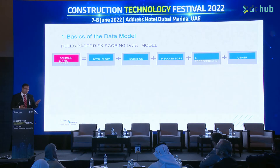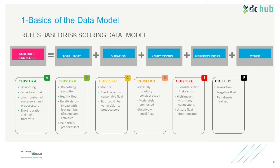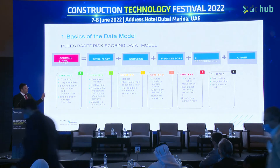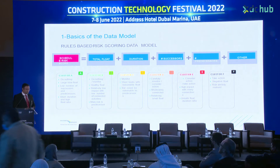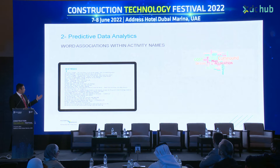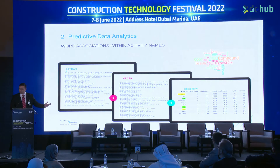If you want to group activities in a certain way, we can look at Cluster A - which means do nothing, we have plenty of float and don't need to worry - through to Cluster F, which means we have negative float, which we all know is a bad thing for our end dates. Looking at schedules, we have all activity names. We can extract those names, clean them, group them, and start reading those properties to give us a better indication of what's happening in the schedule and how we can predict.